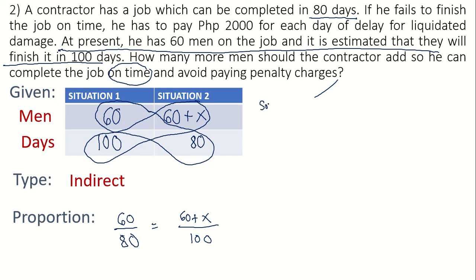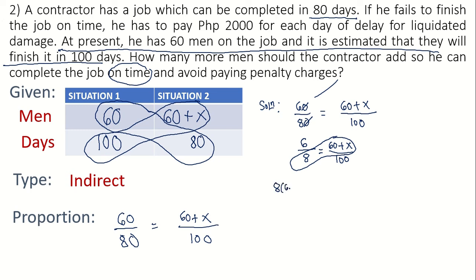Let's now solve. 60 over 80 equals 60 plus X over 100. We can cancel the zeros to simplify: 6 over 8 equals 60 plus X over 100. Cross-multiplying: 8 times (60 plus X) equals 6 times 100. Distributing: 480 plus 8X equals 600.